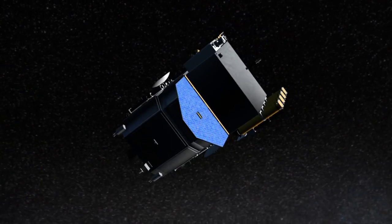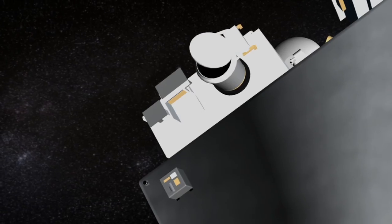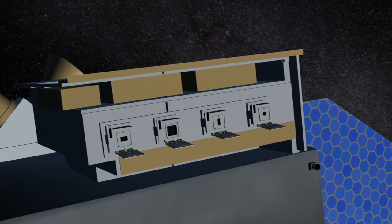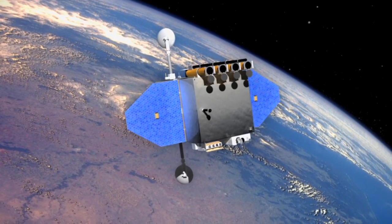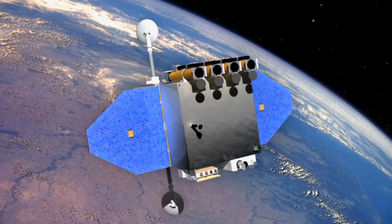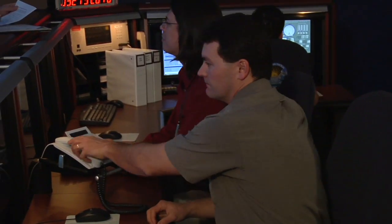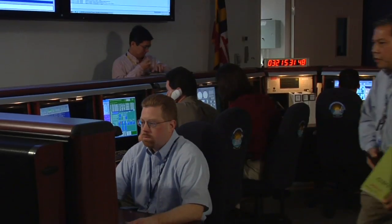During the 5 or 6 years that we're building a mission, building the hardware, designing, testing, we're on the ground. And this isn't where the observatory lives. It lives in space. So that's what the commissioning phase is. We're in our home environment now, where SDO is going to live for 5 or 10 years. And we want to make sure that everything works as we designed it to work. So that's an intense, in SDO's case, 2-month phase of testing out all the aspects of the observatory and the instruments to make sure that they work as designed.